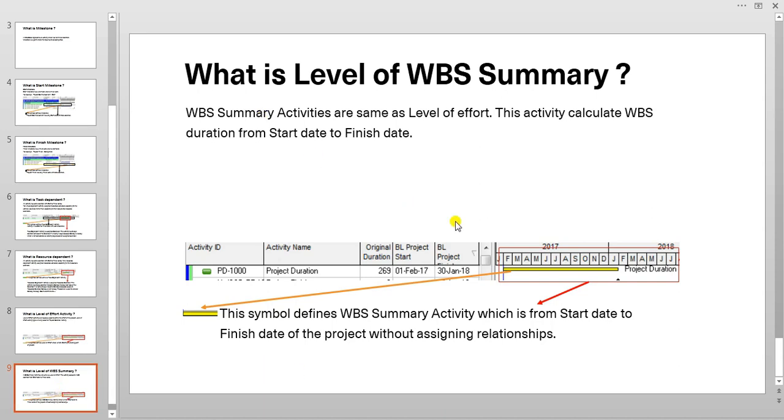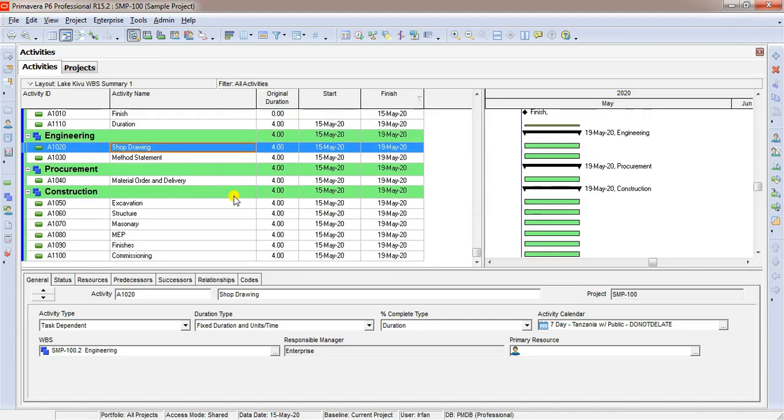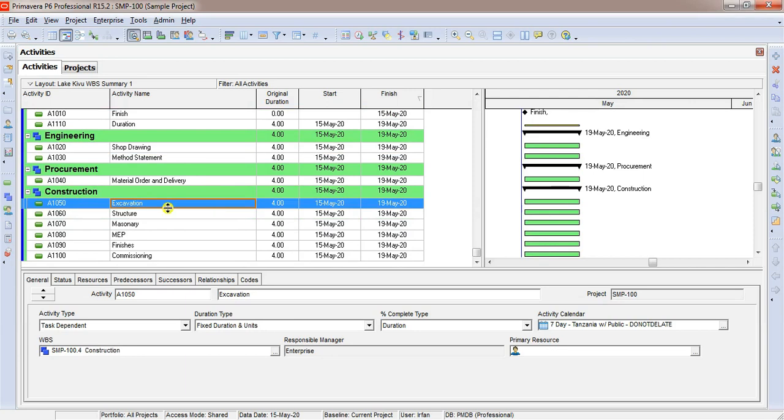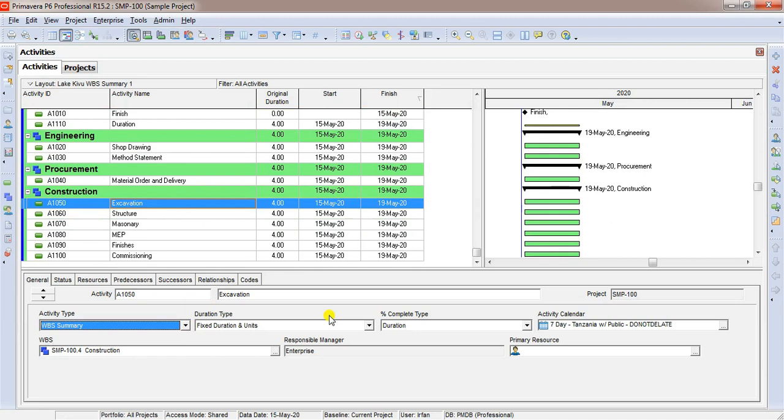What is WBS summary? WBS summary is same as level of effort, but this activity calculates WBS duration from start date to finish date, not from project start date to project finish date. Let us see how it behaves in Primavera. Let's say we have an activity excavation. We are going to change this activity as WBS summary. We will select from here WBS summary. Nothing is changed.